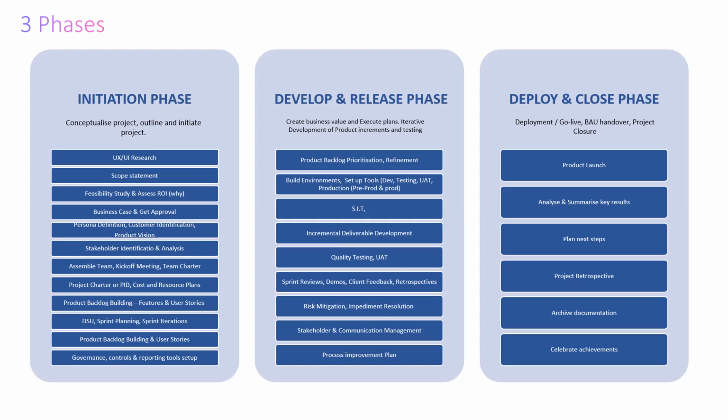Okay. But when you finish everything, you still need to do SIT again. You've been testing to be sure, then you need to run it through end to end. Okay. And it's after you've run it through end to end that you can put it maybe in pre-prod. Whatever it is that you know is ready, that is in a clean environment, you want to try it for UAT. You don't give dirty environment to users to test.